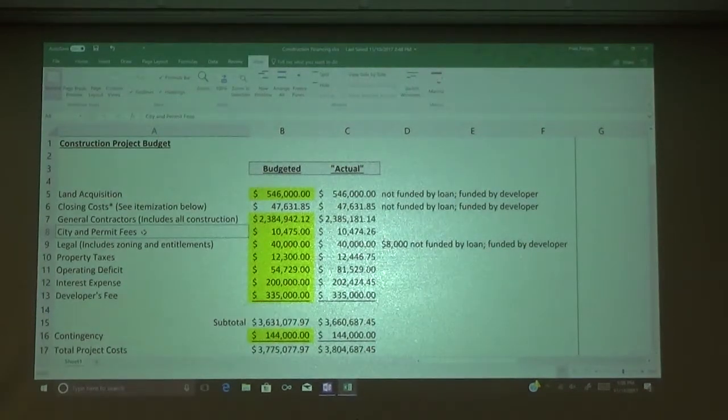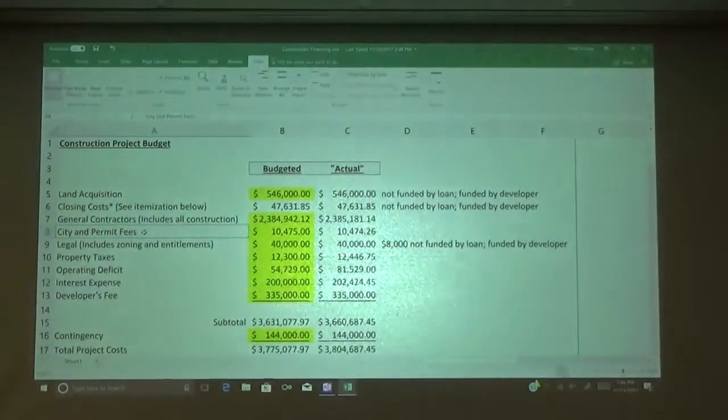Yep. Would a construction loan typically require you to come with architectural plans beforehand? Yeah, most of the time, yes, or at least preliminary ones, maybe not necessarily construction drawings. The difference is that the architectural plans are fairly straightforward and basic, in the sense that they show what it's going to look like, maybe the floor plan layout, that sort of thing.